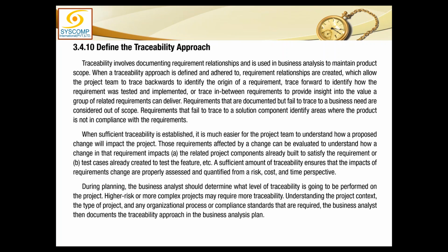So requirements that are documented but fail to trace to a business need are considered out of scope. You have documented a requirement, but you can no more trace it to the business need, meaning the business need has changed, a stakeholder has changed, or something has changed, and you are just keeping that requirement for the sake of it. This is an out of scope requirement now.